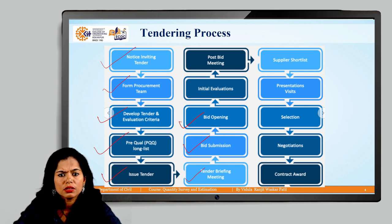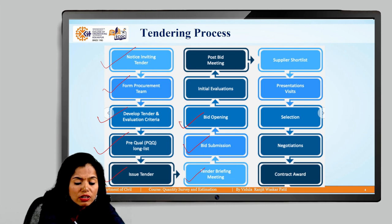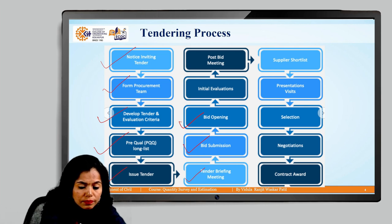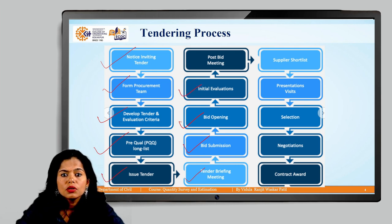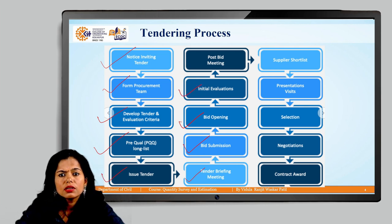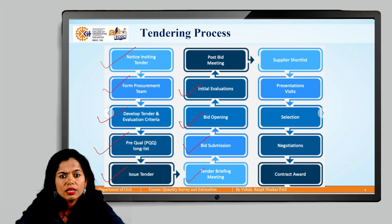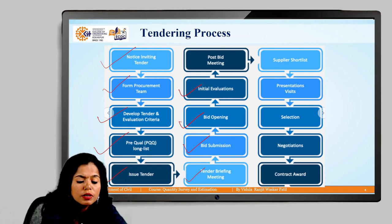In the two-stage method, pre-qualification of the contractor is evaluated first. If they fulfill all the requirements, the second envelope — the bid document — is opened. This is done in front of all contractors for fairness and transparency in the evaluation process, with representatives from each company present.